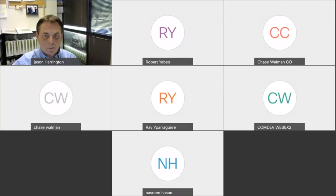It'll be shared on our webpage as well. We'll make sure that our next steps and some of the content that we weren't able to share today are on the webpage, as an overall project timeline. This is our 15%, so our first time going out to the public for feedback. It's our really preliminary conceptual stage. Once we get our public feedback, we'll refine and pick a preferred alternative for each segment. Then, once those alternatives are selected, we'll continue to refine the design.